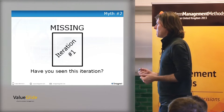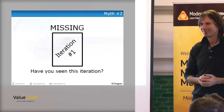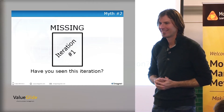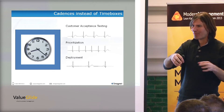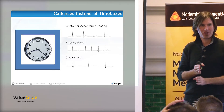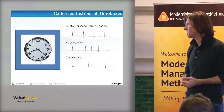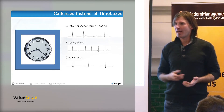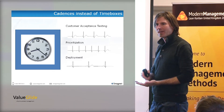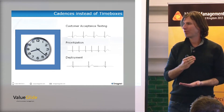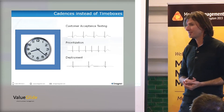Myth number two: the Kanban method is iterationless. What is an iteration? It's a time box. We fill it up with stuff we think we can get done, and tag some rituals at certain points. Kanban can do that. If we think about these things as cadences and I want to do something every two weeks, that would be an iteration. If I lined up customer acceptance, deployment, and a retrospective every two weeks, I would have an iteration — except I'd call it a cadence.